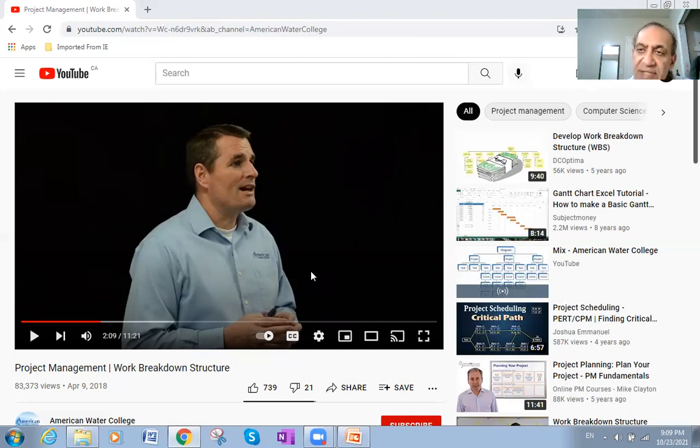Like I said in the example, to get the vacuum, he must take it out of the closet, plug it into the wall, but those tasks together in this phase, the work breakdown, we don't care too much about which comes first from these activities and what comes second. But actually, this is the concern of the schedule, which comes next after the breakdown of the work. So first the breakdown, then after that, the scheduling. We do the breakdown first, then we go for the scheduling of the activities after this.